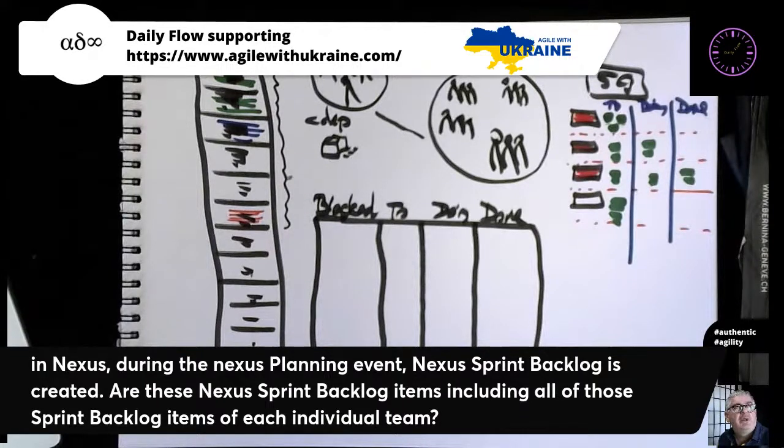That's usually about items that have already started. So when an item has already started, having a blocked column basically loses a signal about where the item is blocked. So if you put something into a blocked column and there's 3 in progress columns, where did it actually get blocked? And we mightn't actually know. And the other thing about a blocked column for something that has already started is you're kind of admitting that things are really terrible around here and so bad that we actually made a blocked column. It's actually part of our process, kind of thing. So that can be annoying as well.